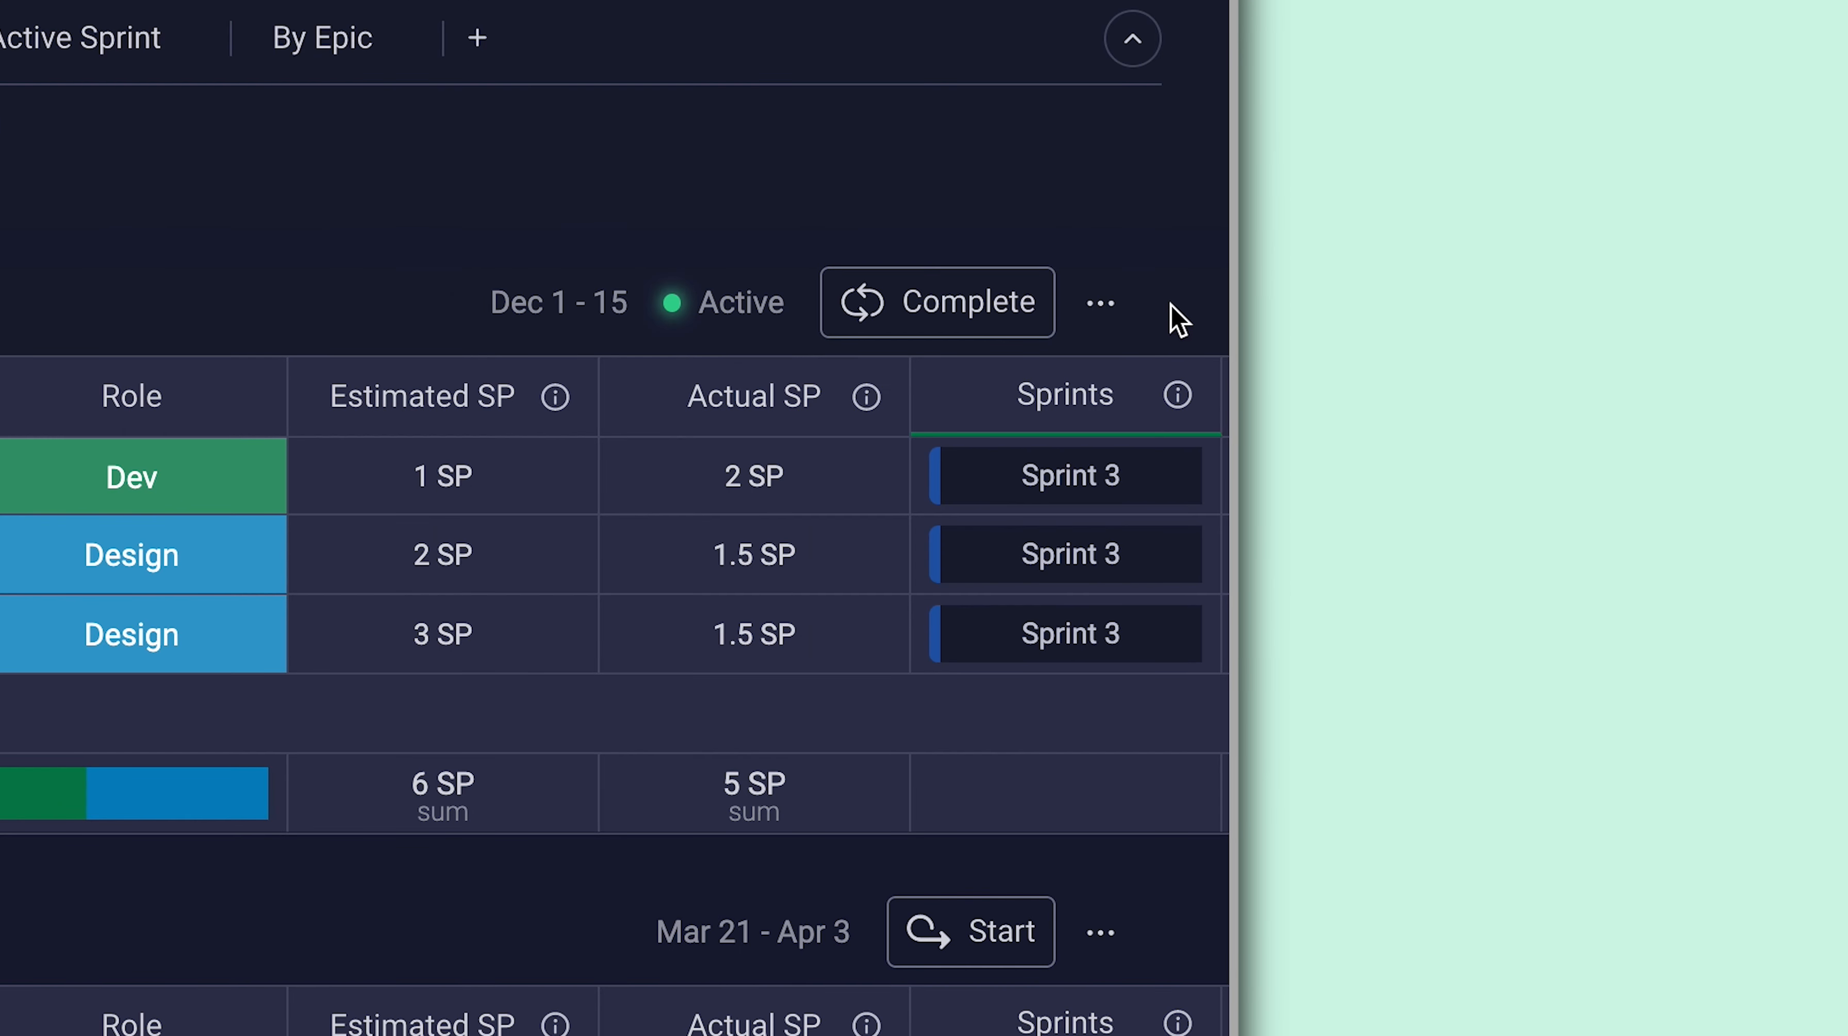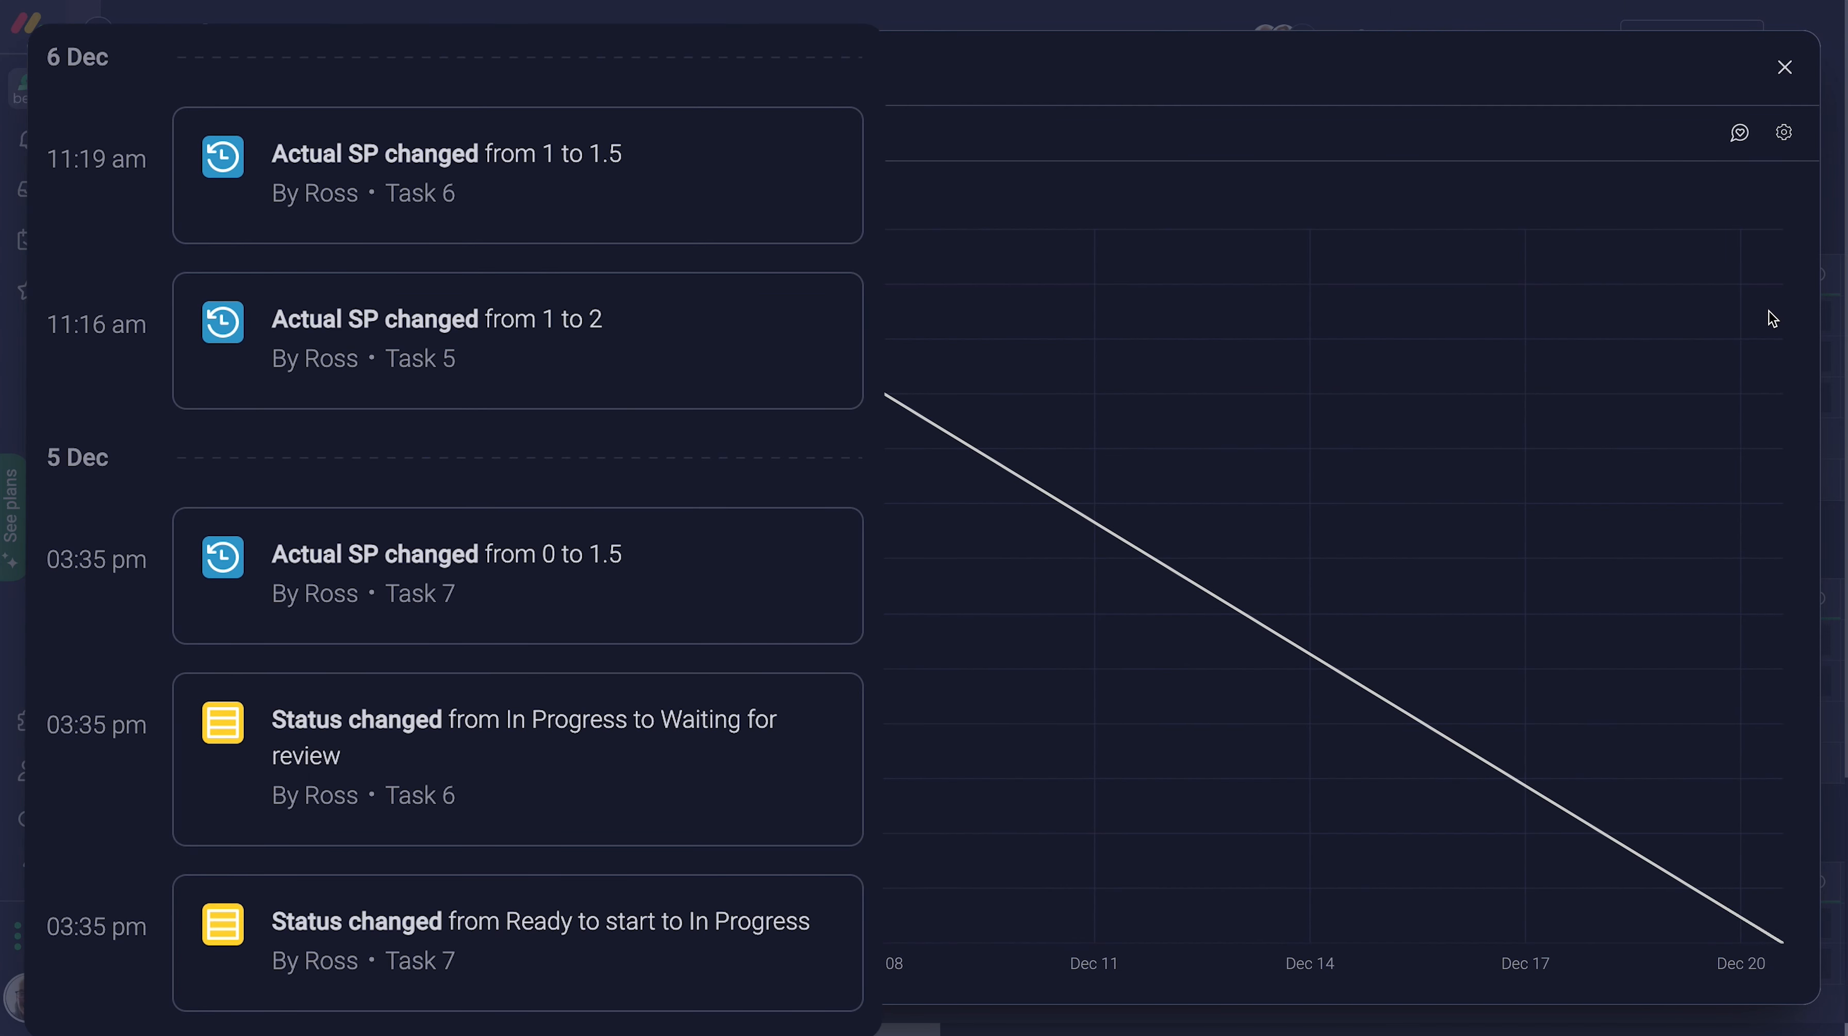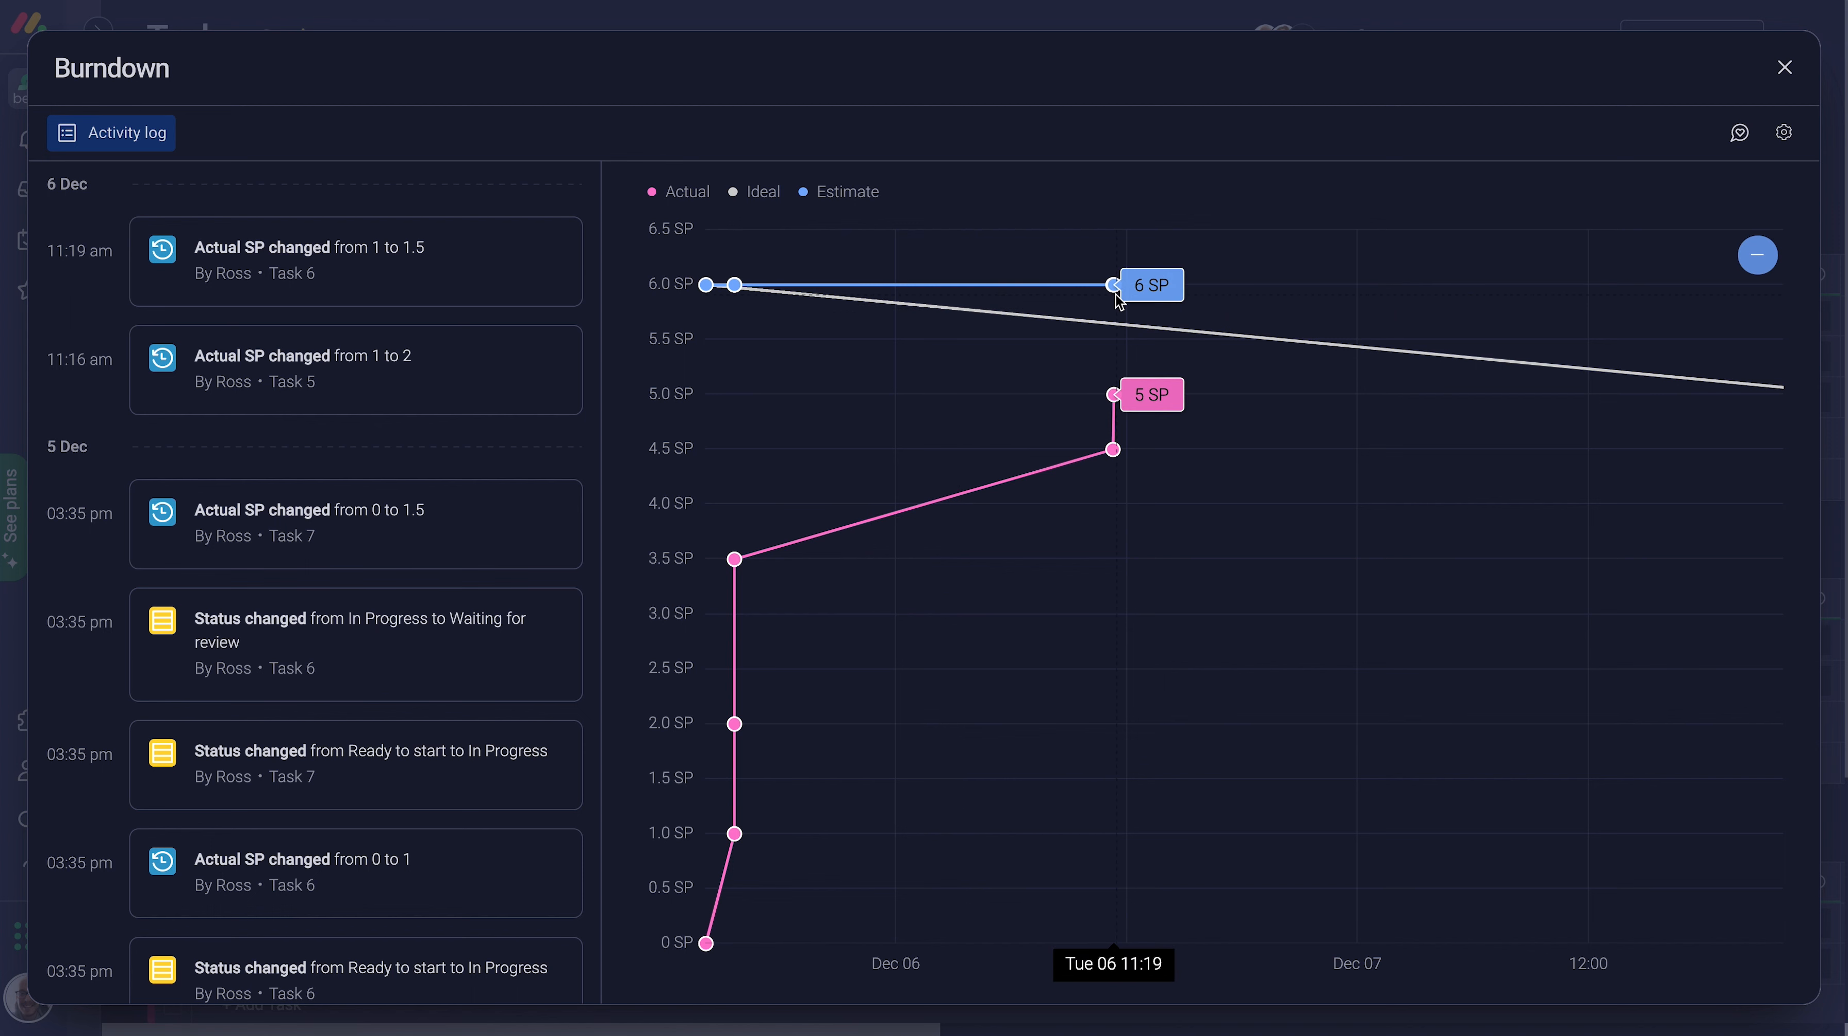And what's more, story points will feed directly into burndown charts, located from here. Here each item in the activity log represents a change to a task in your sprint. And on the chart, track the sprint's progress compared to what was projected. Pretty cool, right?